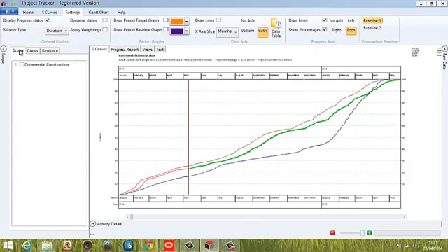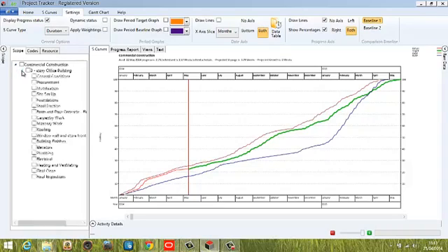The scope that we have here: when we import the data from P6 and the other planning applications, we bring in the WBS, we bring in the project structure. Where applicable, if you bring in a portfolio of projects, so a single XER that has a portfolio of programs, we bring all of those projects through and they would be structured over here. So what this enables you to do is to run S-curves on a specific part of your project, or an individual project that's part of a portfolio. So it's very flexible, very powerful, and very customizable as to the data that you see over here.